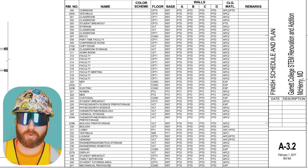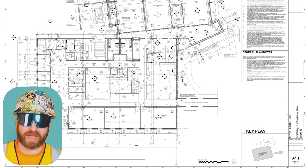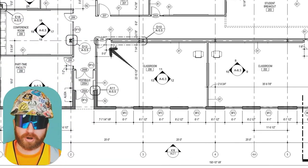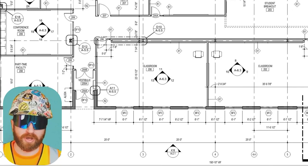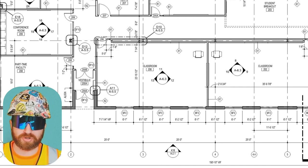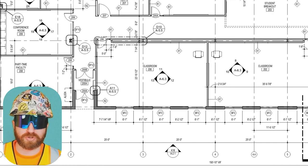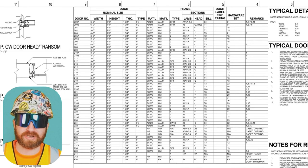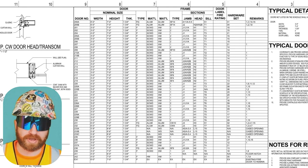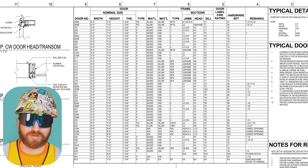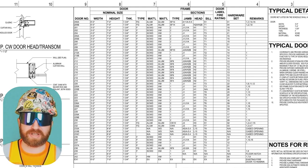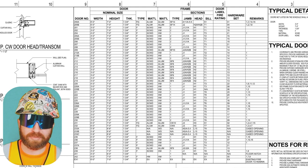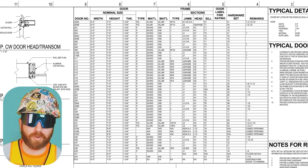They're usually outlined somewhere else if you don't know what it stands for right away. Jumping back to the floor plan, staying in the same room, I'm going to look at the door — all doors will have their own number. What kind of door, frame, and hardware goes in opening 206? That's just too much information to pack onto one drawing detail, so we go to the door and hardware schedule. Similar to the finish schedule, it'll tell me what kind of door, frame, and hardware that door is going to receive. How did I know the finish schedule and door schedule existed? Aside from knowing these come in pretty much every architectural set, we went through the drawing sheets and titles at the very beginning.